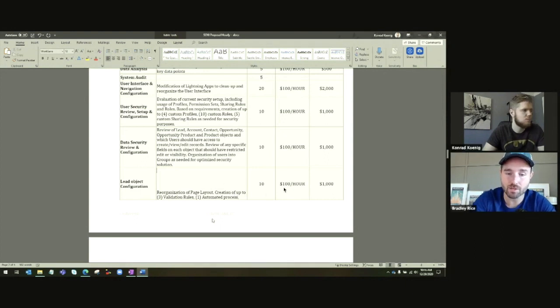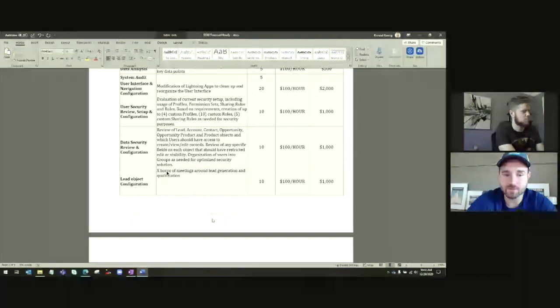But what I think we can accomplish with these 10 hours is you might say includes 2 hours of meetings around lead generation and lead qualification criteria. And now you're giving them, like you said, the meat and potatoes. Where's the meat and potatoes? We got to give it to them. So we're going to do X number of hours of meeting around lead generation and qualification.